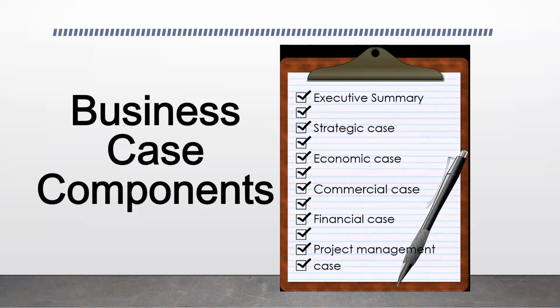Right. After that, you have your strategic case, and we'll get into what your strategic case is. And after your strategic case, you have your economic case. After your economic case, you have your commercial case. After that, you have your financial case. And after that, you have your project management case. And it's interesting that they're all being called cases, as though someone is actually in a court having a case. Right. So this is what you would have on a very high level.